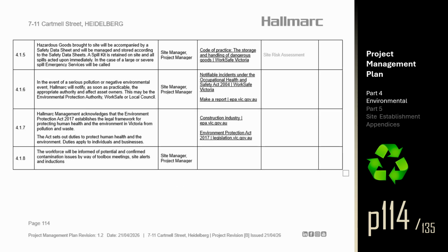Section 4.1.5. Hazardous goods brought to site will be accompanied by a safety data sheet and will be managed and stored according to the safety data sheets. A spill kit is retained on site and all spills acted upon immediately. In the case of a large or severe spill, emergency services will be called.